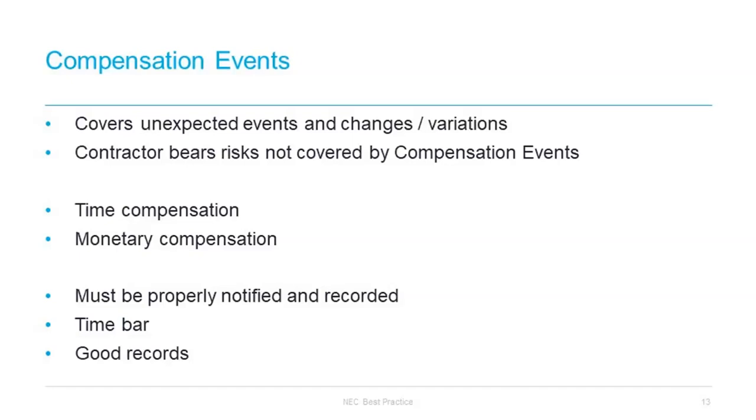The project manager is unlikely to accept a quotation for additional time if the accepted program is not up to date. The project manager will, in that event, probably either make his own assessment of the time impact, or if the accepted program is up to date, then the contractor is more likely to keep the float in any assessment, as the compensated time will reflect the contractor's planned completion of the works or individual key dates.